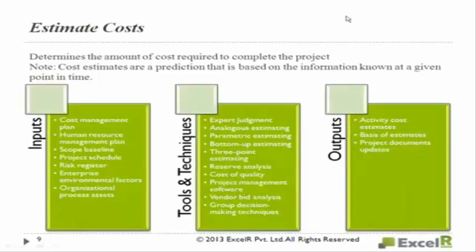So direct costs are the costs which you can assign directly to the project. The salaries of the employees who are working on the project can be assigned directly onto the project. If you take air conditioning costs, there are five, 6 different projects sitting on the same floor. The entire AC cost cannot be assigned to your project. Everyone has to share. So in a way, indirect costs are shared costs. Security costs, everyone should share it. You cannot assign it to a single project. So such costs are called indirect costs.